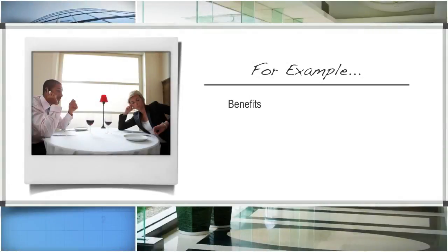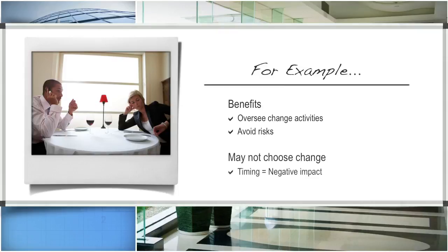The benefit of determining changes to the project schedule permits the project team to oversee change activities to ensure that the impact of the change does not create an undue risk to the project. In some instances, the project manager may elect not to incorporate the change into a project simply because the timing of the change would have a negative impact on the overall project deliverable.